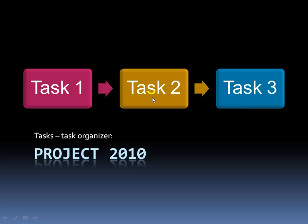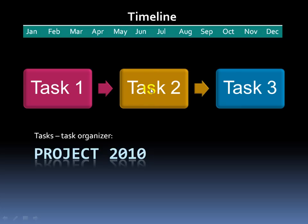Now the tasks are usually tracked on a timeline, where each task is allotted so much time — like in hours, days, weeks, or months — to be completed. And if one task takes longer than its set time, then as a result it may push our project out and extend it beyond its due date, and of course be late.